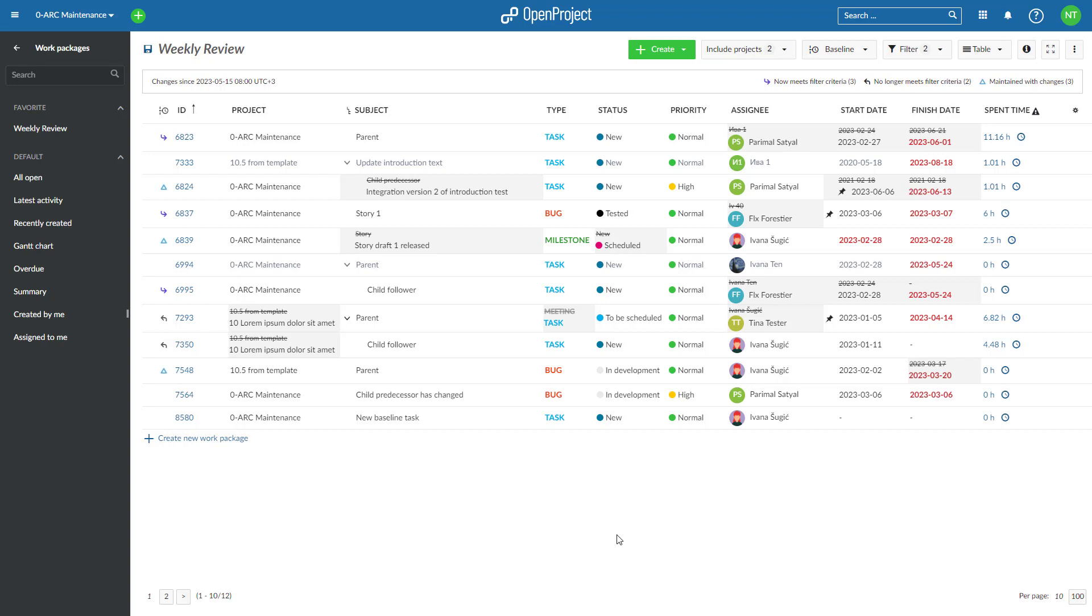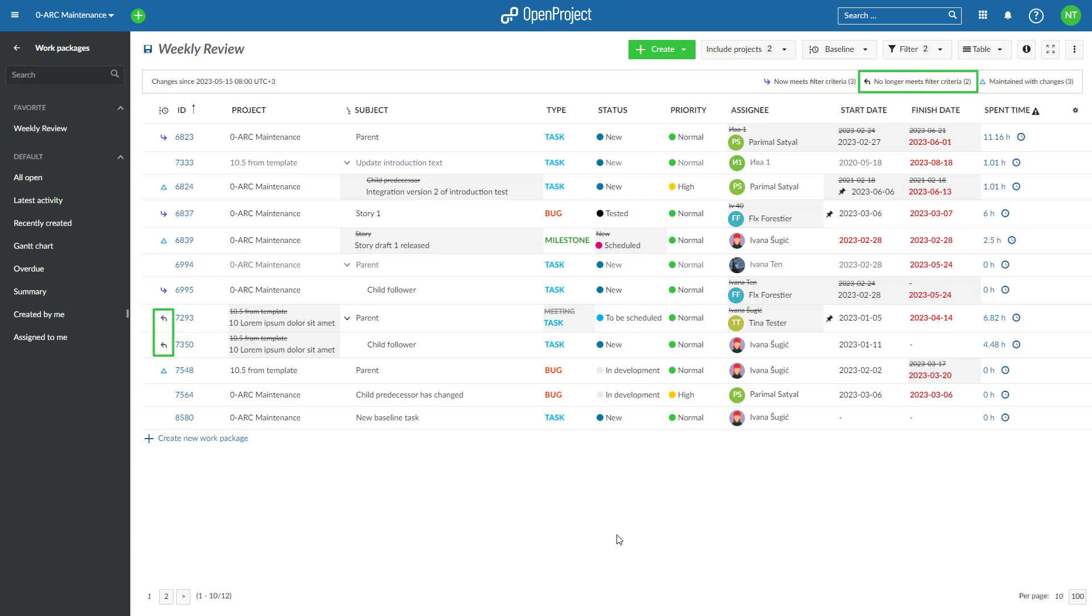After enabling the comparison, OpenProject presents the results in table view, using three icons to indicate the type of change for each work package: the comparison point or period, the number of work packages that now meet the filter criteria and were added to this view, and the number of work packages that were maintained but modified.